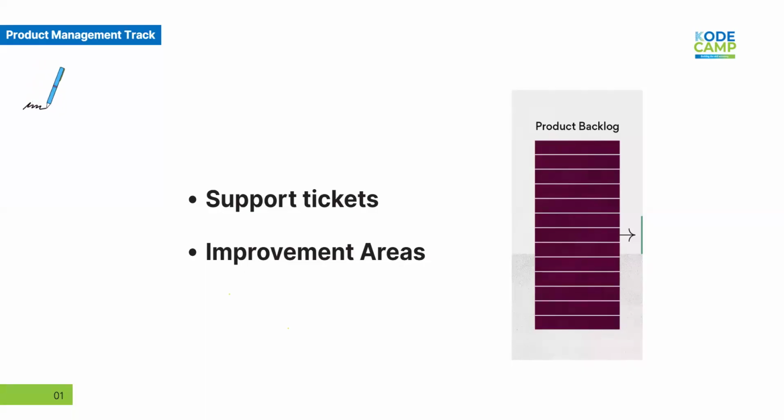So when your support team says, we've got like 10 complaints about transfers failing at night, you take that pattern and create a backlog item, right? Investigate transfer failures reported between, let's say, 10 p.m. and 2 a.m. And then you improve error messaging when bank network is down, right? So these are things that logging it in your backlog can help you achieve.